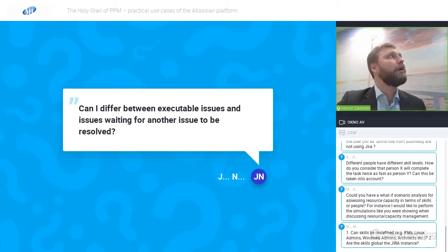Gantt in there, and I can see all the issues that have some dependency. Plus, if I click on an issue, I can see different inward dependencies in that issue, inward or outward dependency, right? So linked issues. In every issue, a linked issue has to be done after this issue. Okay, if I go to that issue, linked issues, okay, has to be done before the other one. So on an issue level, I can see whether there are any linked issues, and this is my differentiation.